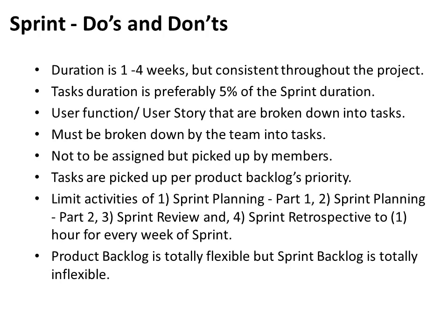They must be broken down by the team into smaller tasks as required by their engineering practice. Tasks are not to be assigned, but to be picked by each of the members according to what they can do best and what is needed. Now, the priority of picking them up also depends on the priority set during the discussion.